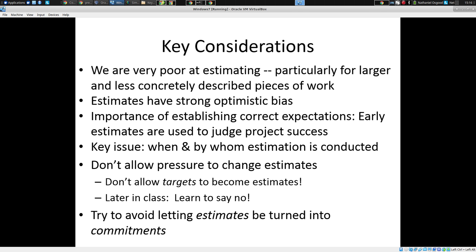So if I again say, this timeline project, how long will that take? The estimates you give for that will tend to be vastly worse than if you were to think about each piece of it, estimate each of those and total it out. In both cases, you get some estimate for the total thing, but in one case, it's on the basis of its constituent parts, its different sub-pieces, and thinking about each consciously. And the other is just, well, it's the whole thing, and maybe some guess for the whole thing. So we tend to be very poor at these more aggregate estimates.